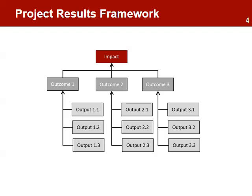The results framework has many variations, but most of them don't include the activities and only focus on the results — the outputs, outcomes, and impact. Activities and inputs are represented on the activity schedule. The results framework may include one or more outcomes, each necessary to contribute to the long-term impact. Each outcome will include all the necessary outputs required to achieve the outcome objective.